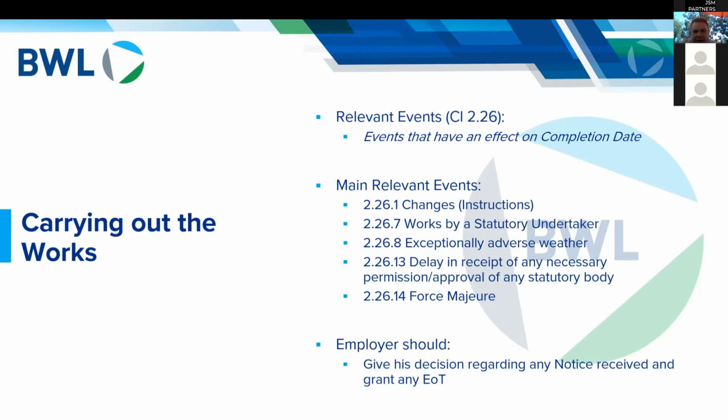So whilst it's in the JCT contract, and whilst some people think that's great, it gives them comfort, from a developer's perspective, leave it as it is. And from a contractor's perspective, it's going to be a case of, I'm not happy with that. I want it defining as being some events. And that definition can take many forms. So it can be very broad, it can be narrow, but it's essentially what the two parties to the contract are defining that term as being. And again, just to reiterate at the bottom, employers need to communicate their decisions regarding any extensions of time.